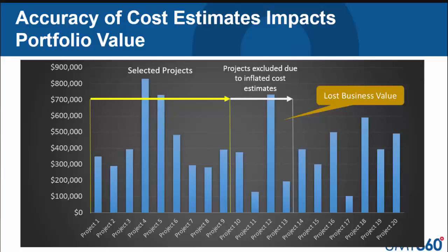Conversely, if the project estimates are too low, you're causing yourself a downstream problem. Later in the execution year, you're simply going to have to start cutting projects as you run out of funds. So cost estimates significantly impact portfolio value.